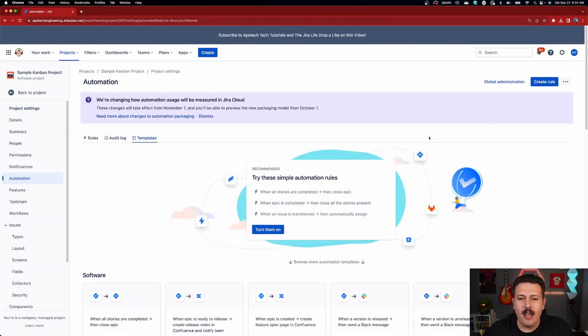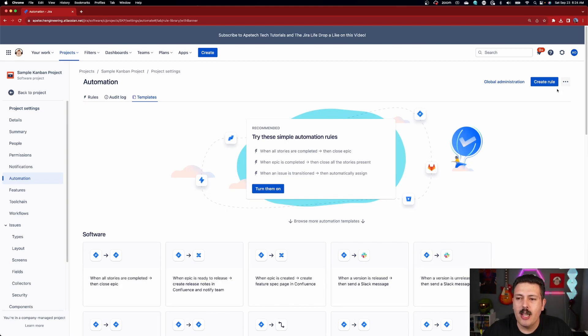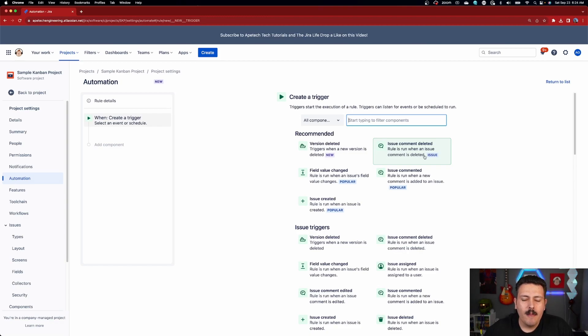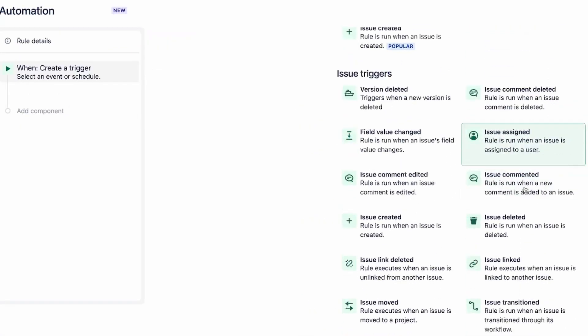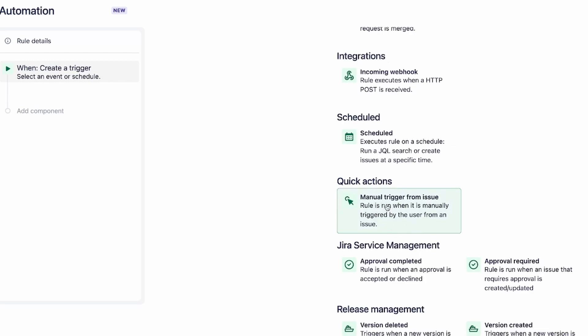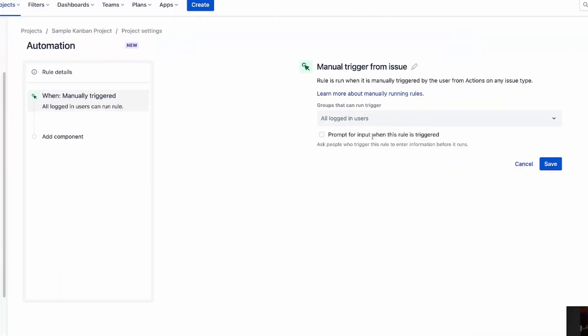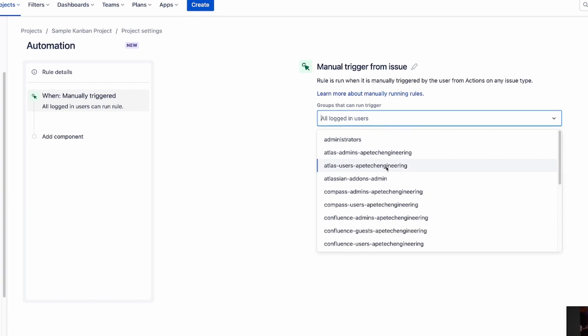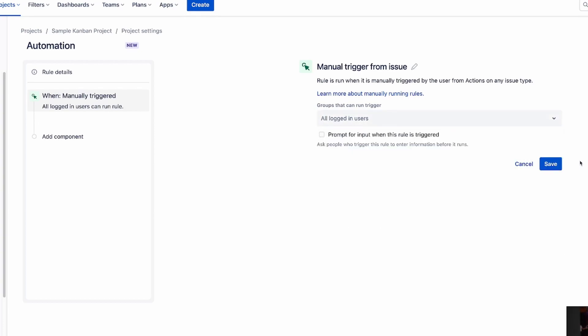The first way of making this automation rule: we're going to dismiss that November 1st message and create a rule. The way I recommend you do this — in order to make sure you don't hit those limits — is to make your trigger a manual trigger. Scroll down, find your quick actions, and click on the manual trigger. This rule is only going to run if you click a button in the UI, which means it only runs when you actually need it. You can restrict who can run it — for example, only your scrum masters or product owners — but I'm going to leave it with the defaults and click save.